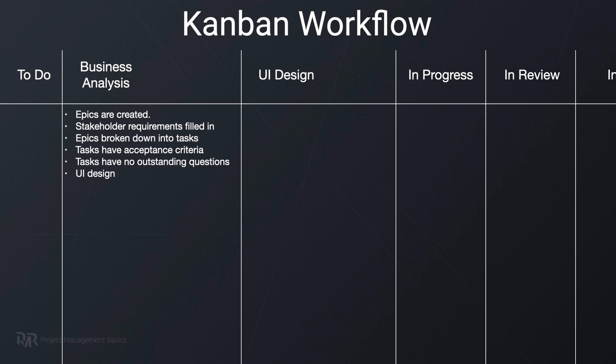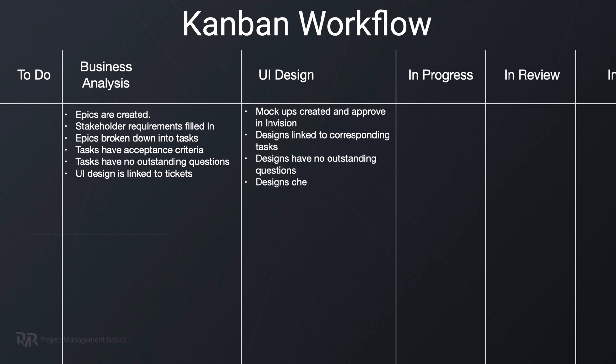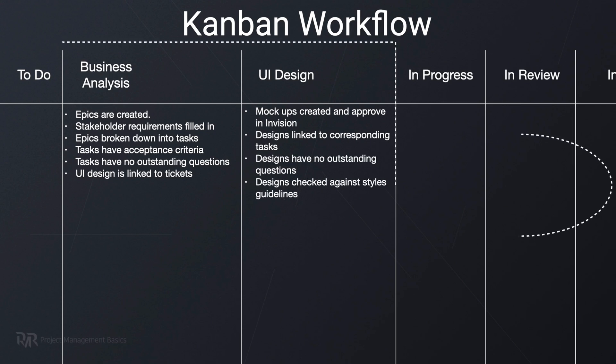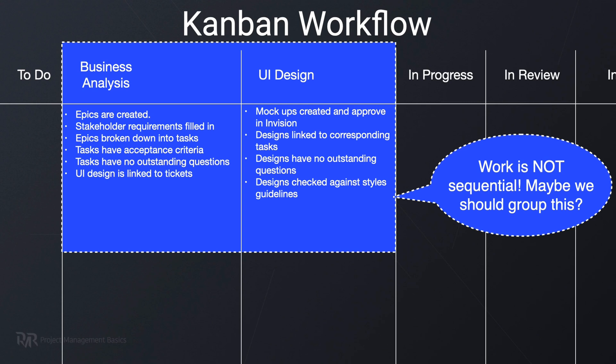Here's a practical way to develop a perfect Kanban board: start by listing all the stages of your workflow, then list the definitions of done for each column, and finally review the whole workflow and see where you can group stages into one column. You must do this exercise together with your team — they can help you find gaps in the process or things done differently in the real world.